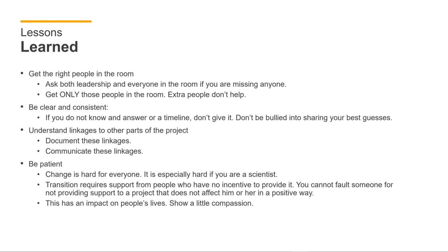Understand that you may not be able to move in until finishes have been put down on the floor. You don't want to guess those dates. You want to know those dates. You want to be able to integrate that construction or commissioning milestone with the operational milestone.